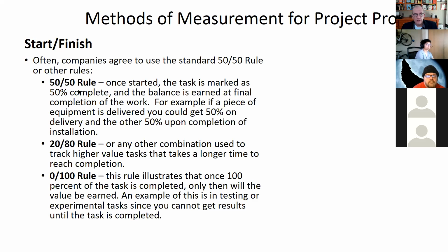But it could be, however the contract is structured, could be you get nothing till the end, right? So at the end of 10 days, when this activity is done, you get paid 100% of it. So it's good for cash flow measurement if your contract is requiring something along that line. It's not really good for trying to figure out where you're at and are you over budget or under budget. But it may be, say, a consultant, maybe a financial consultant like a quantity surveyor, that is following along at where you are in the project and whether your progress payment is eligible for full payment, what they may be looking at if you've agreed to it in the contract.